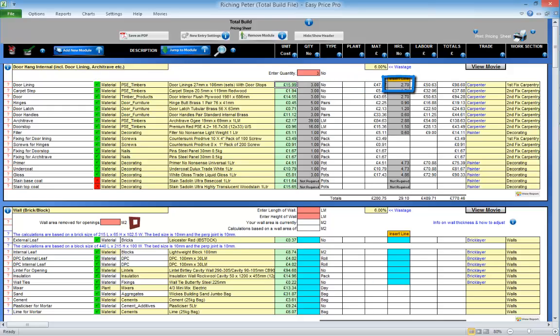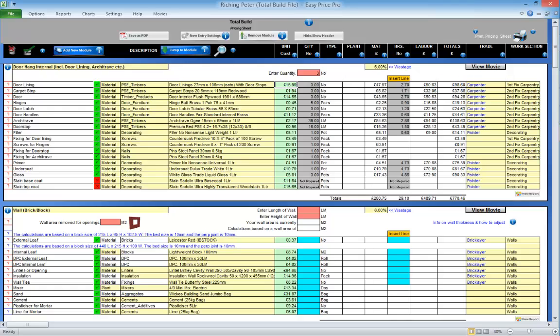The associated hours of the item or task will be in here. The cost of the labour will go in here. Here's the total for this item. The tradesperson who's allocated the task is here. And here's the work section that this task will be allocated to within the payment and work schedule.